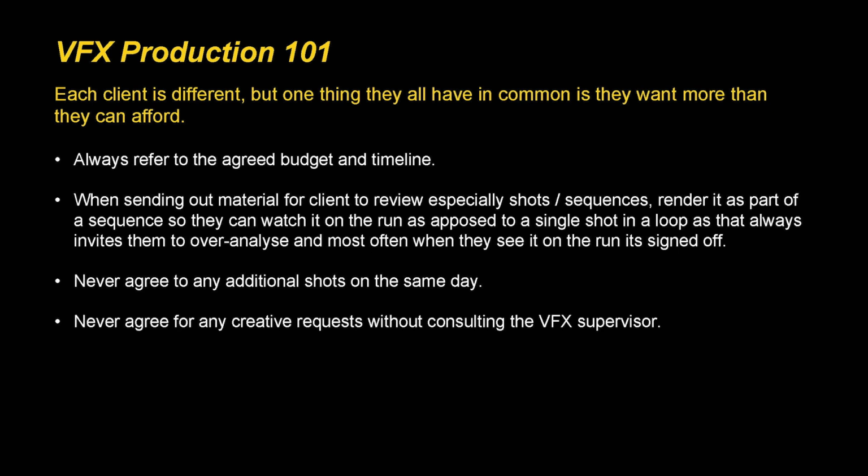Lastly, never agree to any additional shots on the same day. You are going to get clients during review, during dailies, saying, hey, can we have additional shots? Or can we push this a bit further by extending the shot or having 5 creatures instead of 1? That sort of thing. You've got to remember that you as a VFX producer have done a bid, and that bid is based on an original brief. We call it scope creep. Scope creep is a term we use where the client has crept out of their original brief or the original scope. Then never agree to that on the same day.